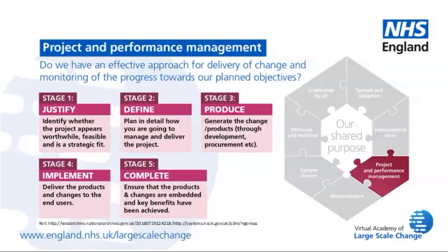And this will help us to have better quality control over our change programs and increase the probability of delivering benefits of real importance. There is a tension here. If we go back to our lead session on leading large-scale change, we know that large-scale change can be emergent, so it's very difficult to plan 2, 3, 4, 5 years ahead. But we should be planning more in large-scale change in small incremental steps, so thinking those 30, 60, 90-day cycles, and applying that project management discipline to ensure that we have a clear vision of what we're trying to achieve and how much we're walking towards that achievement.